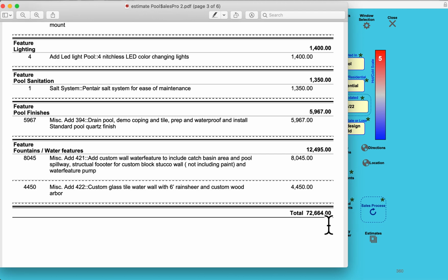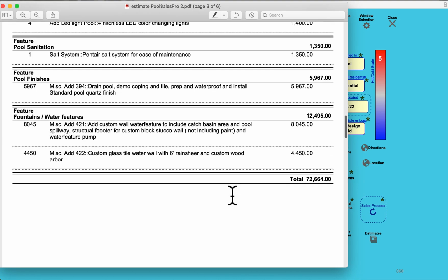And I used to explain, if it's here, you get it. If it's not here, it's going to be a change order, or ask for it. And the guy that gave you the lump sum, you better go back and figure out what he's including in his lump sum.